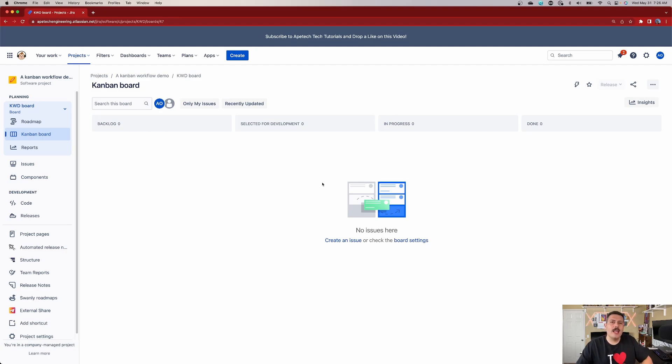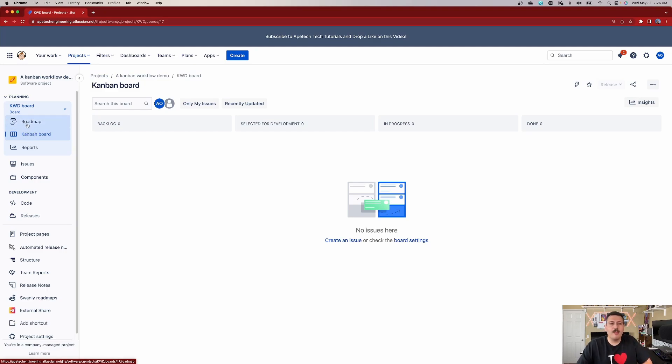How do you know it's a Kanban project? Two things give it away. First, it says Kanban on the left-hand side. Second, you'll notice there is no backlog — there's no backlog between Roadmap and the Kanban board. Those are the two biggest key indicators. In a Scrum project, you'd see Backlog and Active Sprint; in Kanban, you won't get either of those.